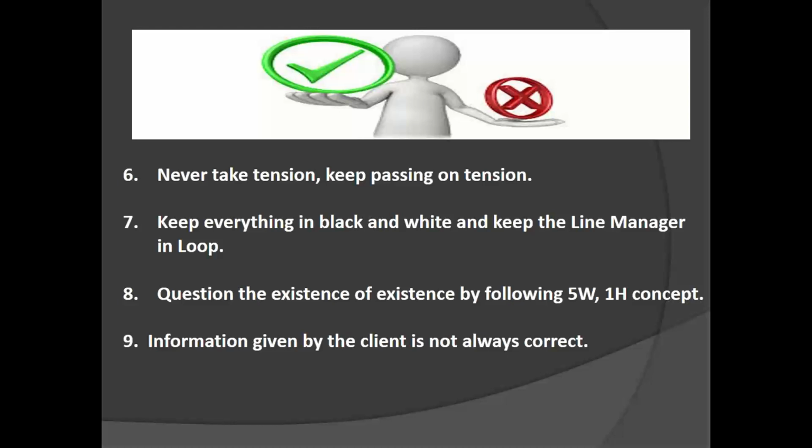So that's the reason you have to keep everything in written format. In spite of explaining orally, after explaining, you should open your laptop and send a mail to this developer, keeping a CC to the project manager, saying that this is the requirement I have explained to you just now. You have to complete this requirement within 1 week. Please confirm the same. If you have shot a mail to him, then you will have evidence.